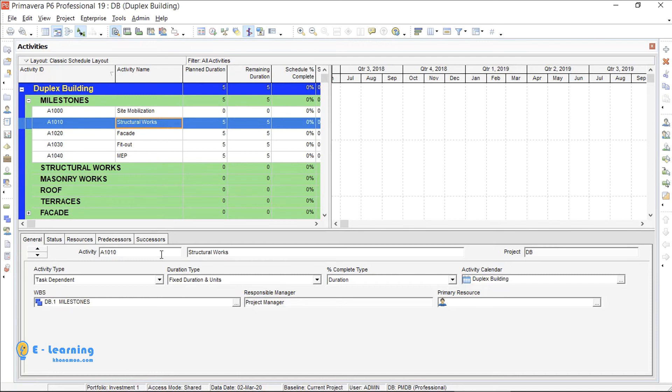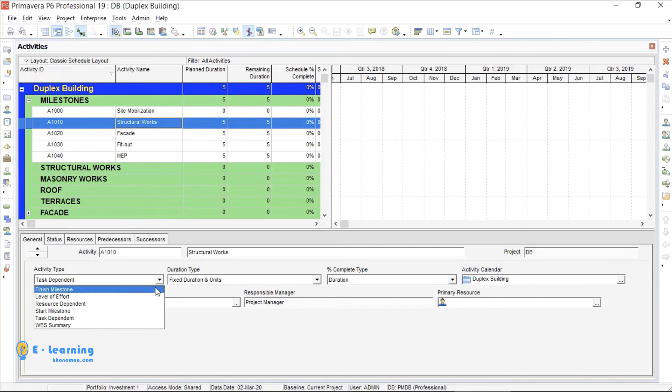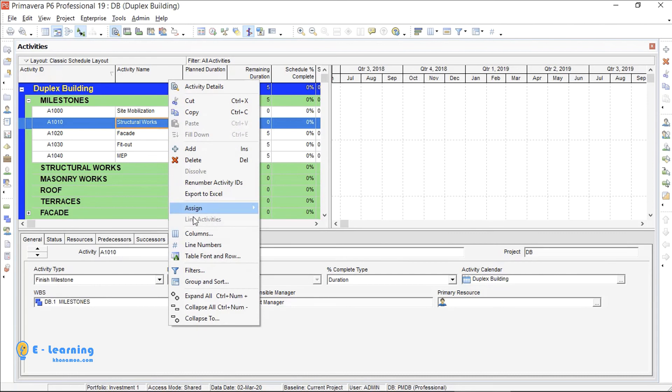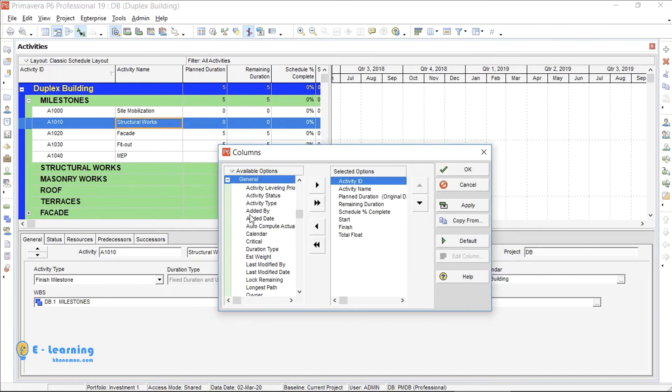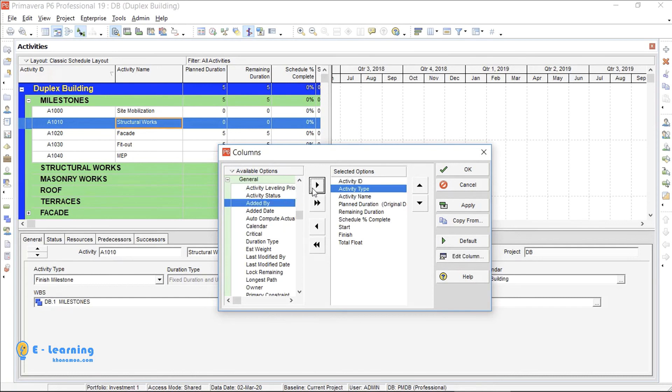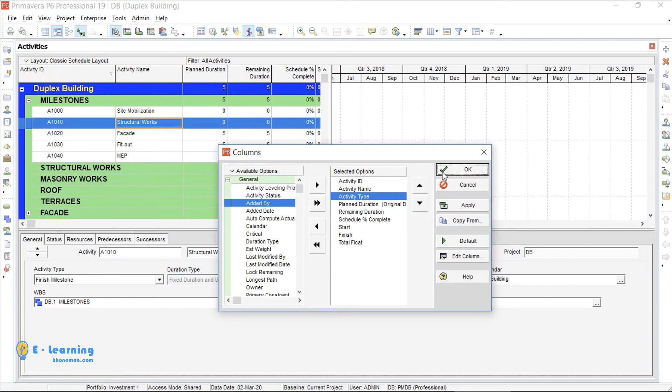It is not needed to change activity type one by one. I just change the activity type of the top activity into finish milestone. Then I right click on columns, select columns. From general, select activity type. Press this Add to List button. I want to see activity type after activity name. I bring it after the activity name and press OK.